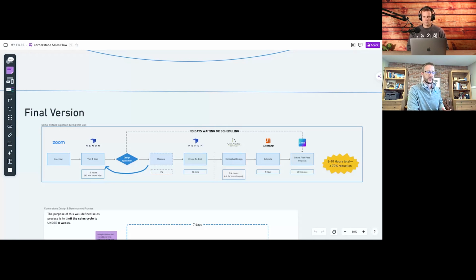Do you want to go all high end, natural marble, or are you looking to keep it a little bit more modest? But the Moscow report really does tell us what they're interested in doing. If real marble ends up on that Moscow report as a must or should have, that's what gets priced. But if it's not, then we price it with regular stuff based on their budget.